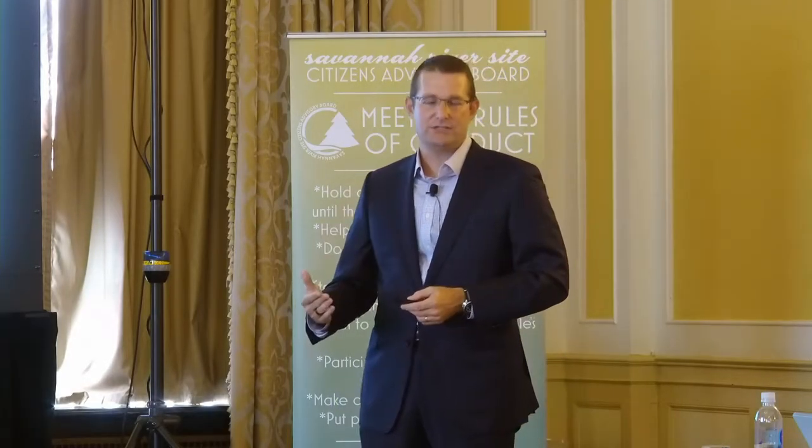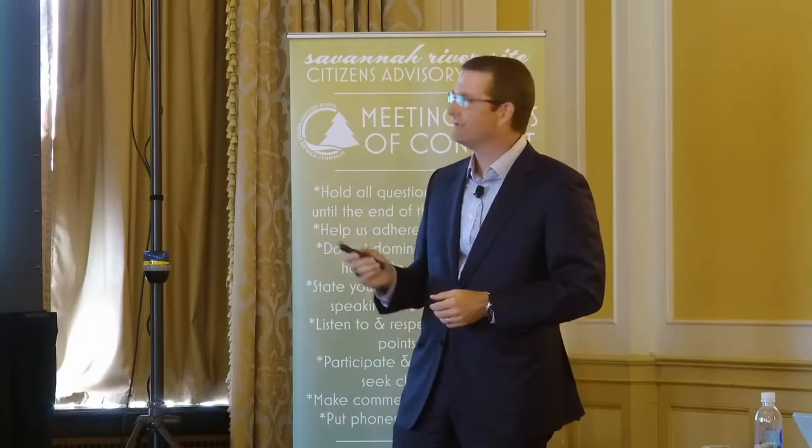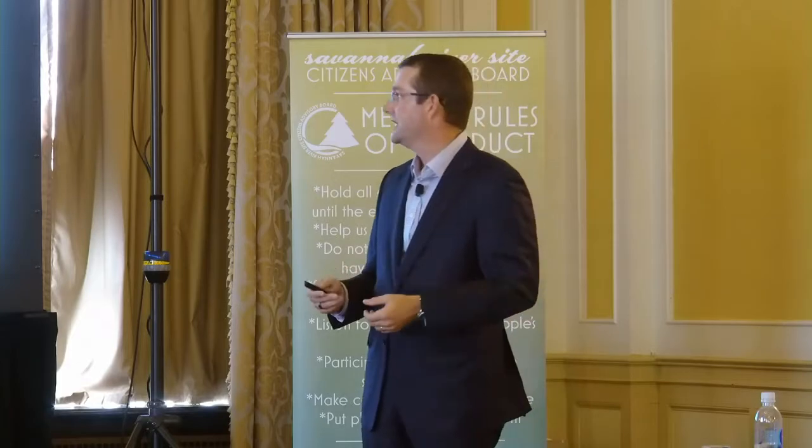And the reason that's important is if you go to 3 operating shifts, you now create the potential for some periods of round-the-clock operation. And that brings in an efficiency because you aren't having to shut the process down at the end of each shift and bring it back up. You can just keep it rolling through a shift change. So the modifications in phase 2 included some balance of plant modifications to support extended shifts. Some other things to improve the flexibility of the facility.